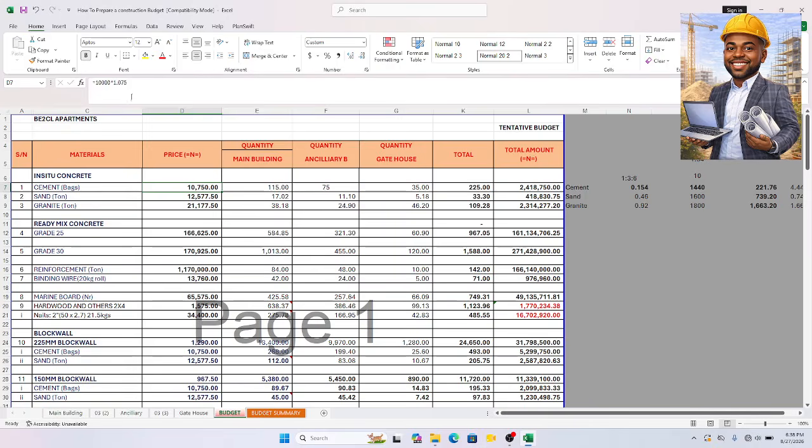All right, so this is what we have. I add VAT to it. Of course, let me not confuse you. These VATs are recoverable. Recoverable in the sense that the client that gives you the job, before he pays you, he has already paid VAT. He gives you an advance. He has already paid VAT on that particular amount. So as you are paying your own subcontractors, and where you are buying materials, you also pay VAT. But your accountant will work on it to recover those VAT for you. That's what we call a recoverable VAT. All right. So we are done with this phase.